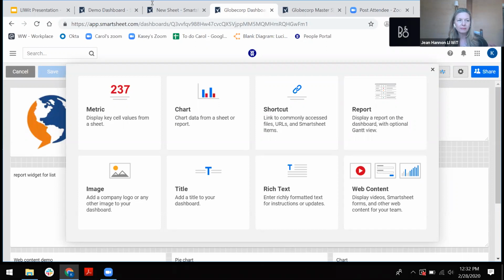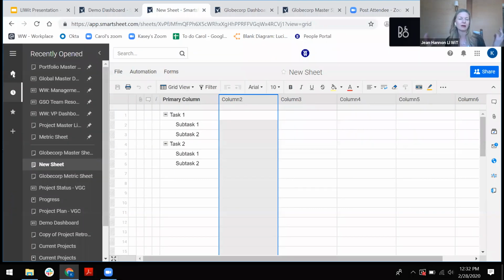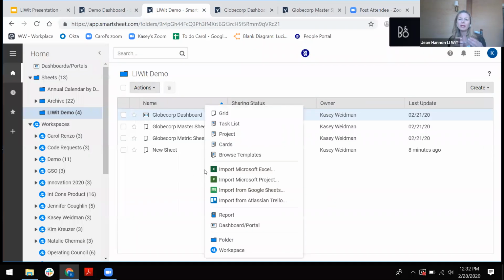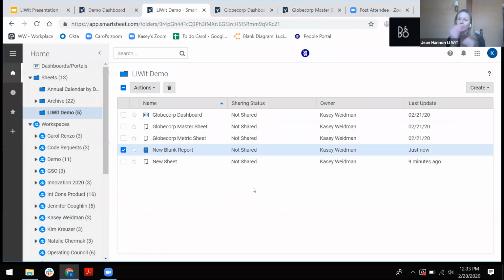Maybe there's 5 milestones, right? You need a purchase order, you need art, you need it to deliver into the warehouse, and make up 2 others. If we have those 5 milestones for those 10 in one report, we can then create from that report widgets that just show overall status, where the alerts are. Is that how these dashboards really get to show to more senior management the overall status of the health of that department plus the health of each individual launch?